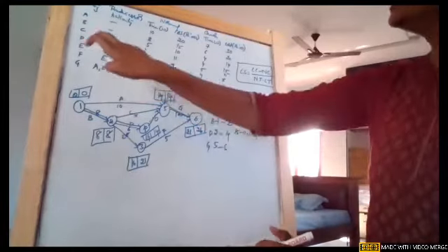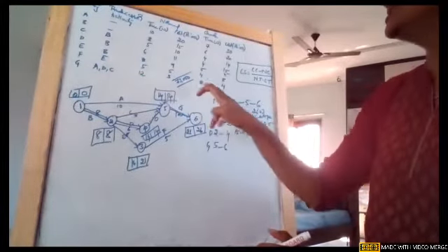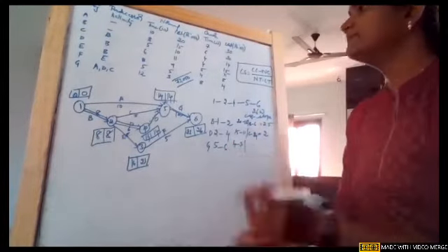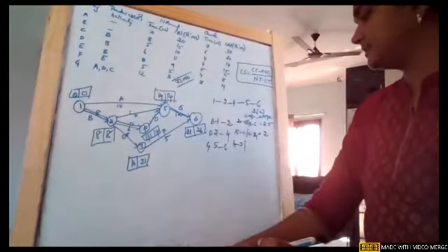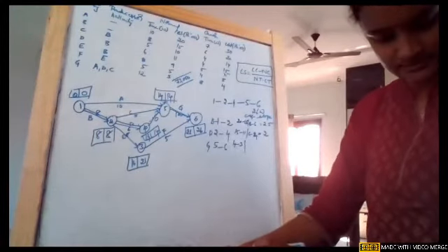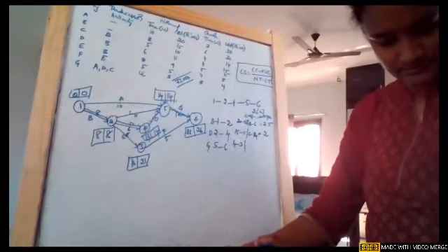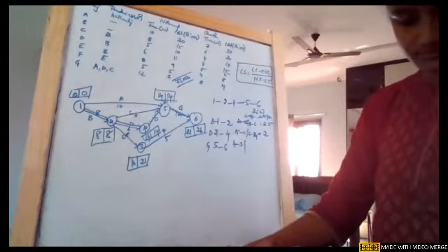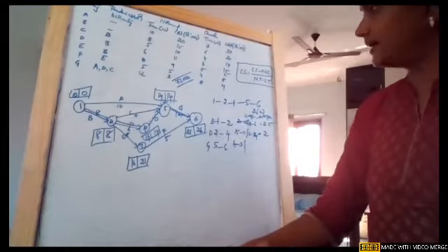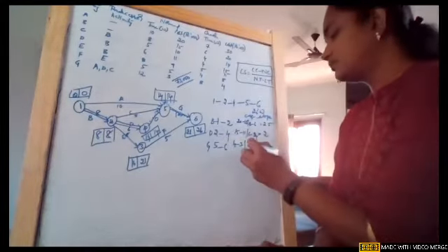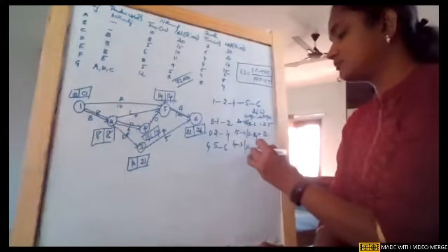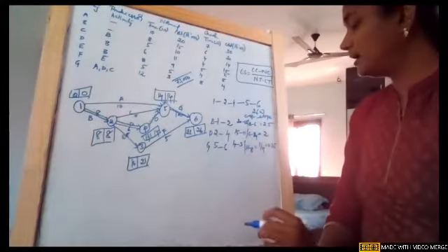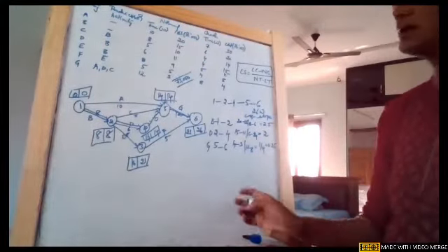Then activity 5 to 6. Activity 5 to 6 is G. The costs are 4 and 3. So 4 minus 3 divided by the durations 12 and 8. 12 minus 8, it is 4. So it is 1 by 4, which is nothing but 0.25. So this is how these are the cost flows.